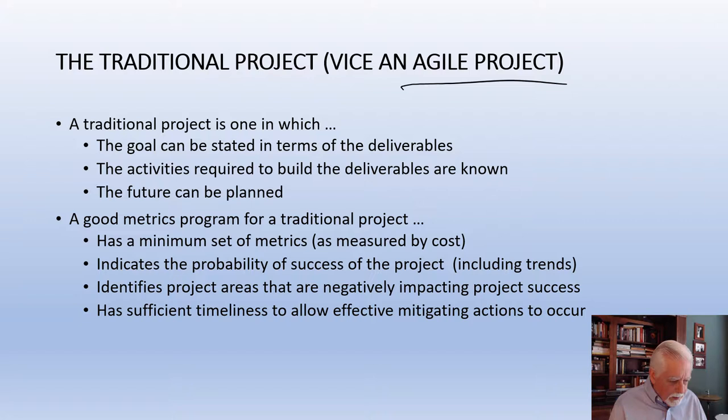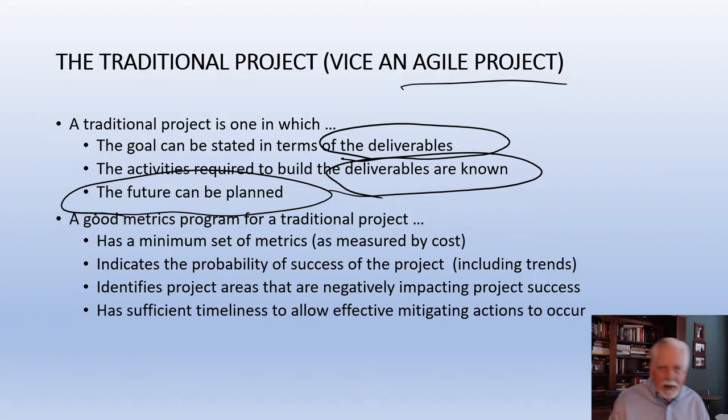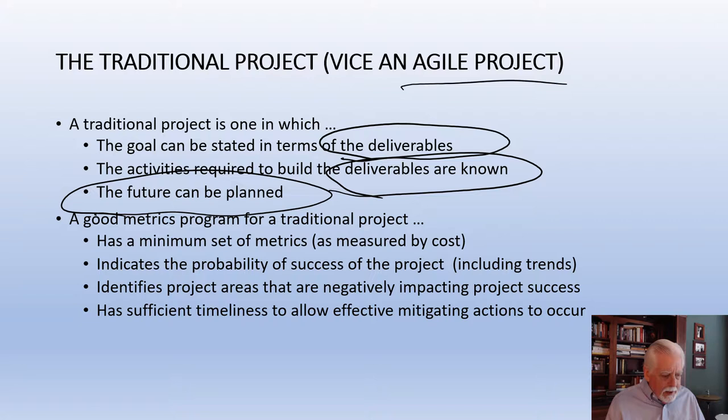Let's look at a traditional project versus an agile project. A traditional project is one in which the goal is stated in terms of the deliverables — we know what we're building — and the activities required to build those deliverables are known, so the future can be planned. In an agile project, we don't plan the future, we adapt to it, and the goal is stated in terms of the user's needs. For now, let's concentrate on the traditional project.